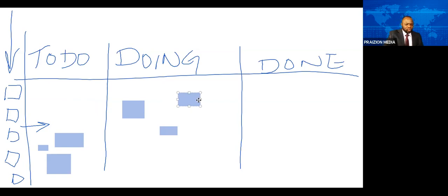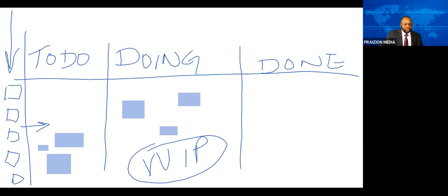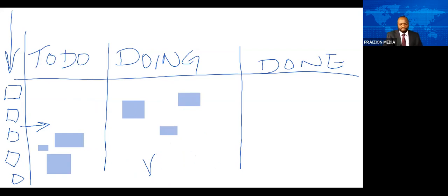You're pushing the whip, not the physical whip, but the WIP, the work in progress limit. So every team decides on their WIP, work in progress. What is the maximum number of things we're going to have spinning in the air? 1, 2, 3. That's enough. No more than 3.